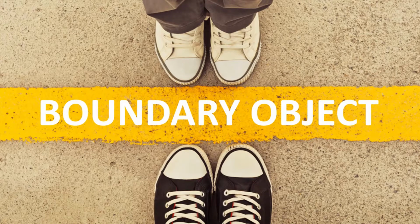This is something that sits between different groups and helps neutral communications. It can be a mathematical model, a shared project plan, a roadmap, process maps, all kinds of things. But there are some rules that it has to obey. It must be co-invented and collectively owned. All the relevant groups must be involved. A boundary object cannot be created by one team and passed to another. That triggers misunderstanding and the not-invented-here thinking. If it's going to be collectively owned, it should be created in neutral territory. If one group hosts the work, it subtly and progressively becomes theirs. You need to find a workspace outside the participants.